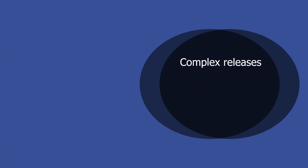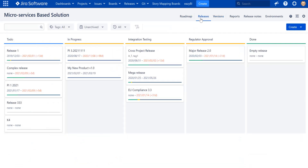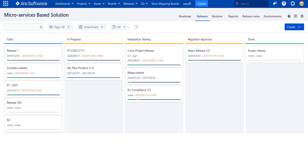But what about complex releases where business value can only be achieved after releasing multiple versions? It's convenient to see all versions from multiple projects on the same board and arrange them by tags or search functionality. But sometimes you need to track a cross-project release involving multiple versions from multiple projects, or create a package of multiple versions that must be released together to achieve business functionality. Release management has a feature to cover this case, called releases.